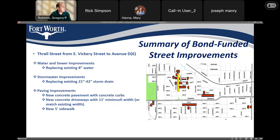Thrall Street from Victory to Avenue D: we're replacing the existing 8 inch water line. We're also replacing the existing large diameter storm drain under the street. As far as paving improvements, we have new concrete pavement with concrete curbs, new concrete driveways, and new 5 foot concrete sidewalks.